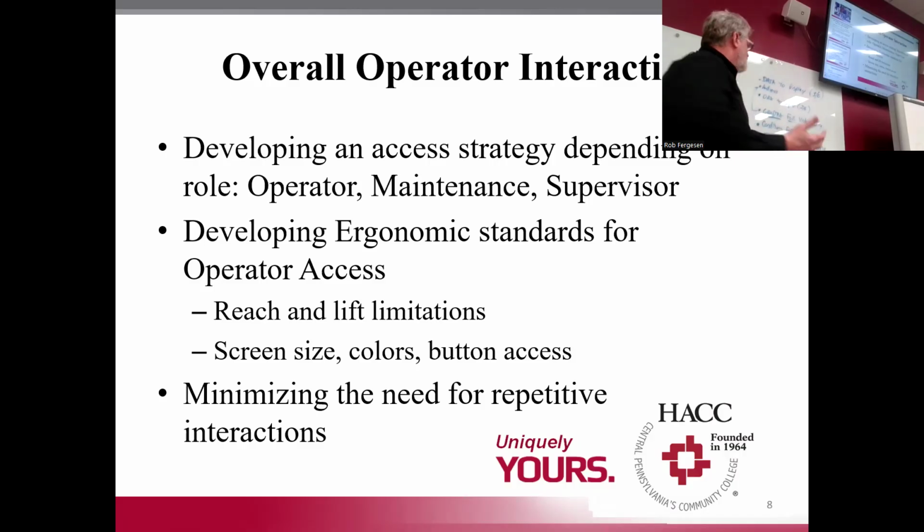And when you finish developing your requirements, you're going to have each one of them with expectations about where they have responsibility to give you feedback. If you let the different operators each get their own individual feedback, inevitably you're going to create a battle, because operator A won't agree on what operator B wants. The supervisor won't agree what the plant manager wants.